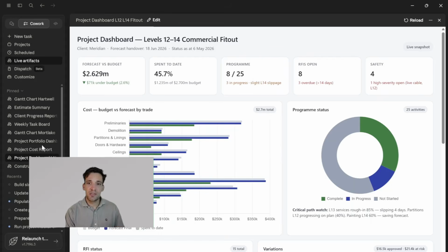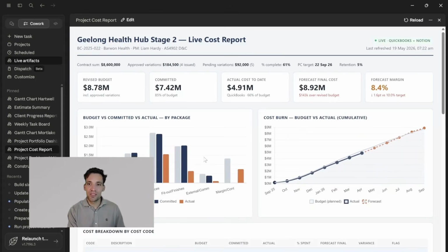Okay, the next dashboard is sort of a zoomed in on this detail, which is a more detailed project cost report where you're linking, again, your project progress and what percentage complete different tasks are to the underlying cost data in something like QuickBooks. Again, because QuickBooks doesn't natively integrate to Claude, you'll have to look at some workaround solution like Zapier.